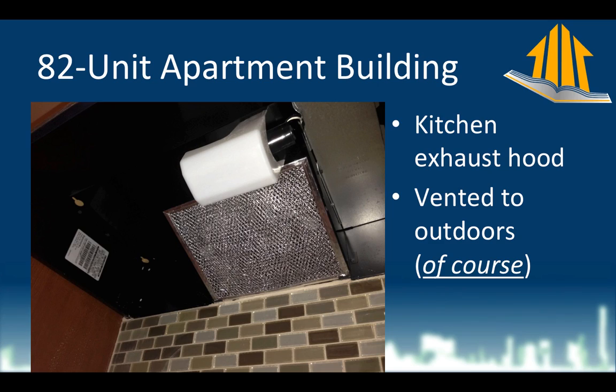So the second job that I'm going to describe, aside from the single-family homes, is this big multifamily building where I am the commissioning authority, which means I walk around with my clipboard and my laptop and my hard hat and my safety goggles, and you may see a video like that floating out there. I've been doing a lot of stuff on this site, and it's really interesting to see because you'd think that the bigger the project, the more money, millions and millions of dollars, more and more people who are specialists in their field, there would be less problems. The opposite is true. More problems. So really important to commission, and my main job is just to double check everything.